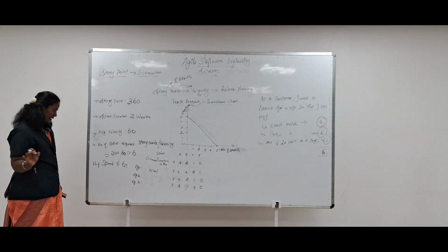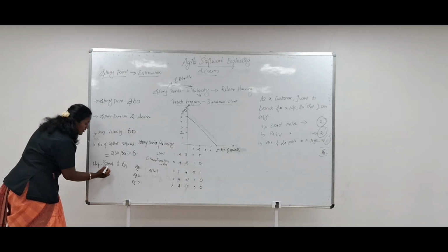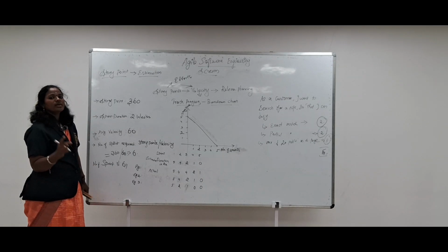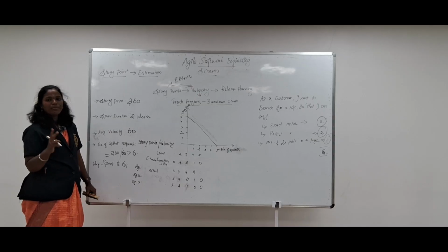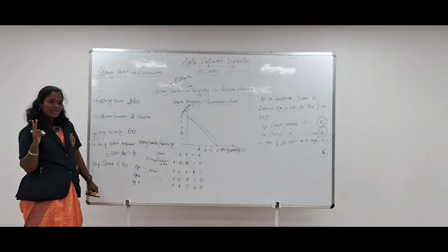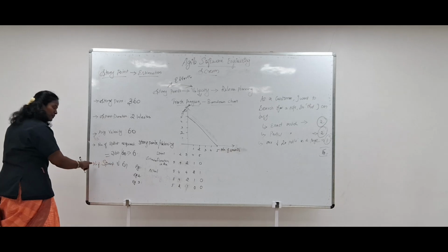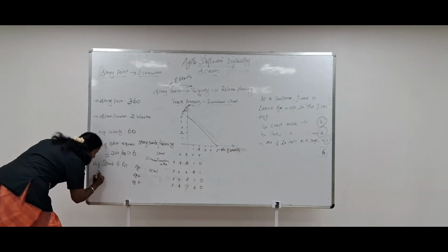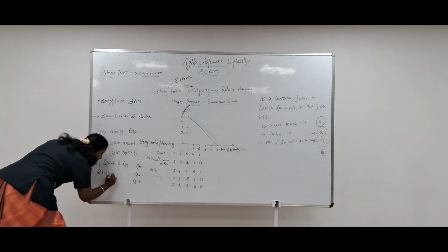The number of sprints required is 6, and obviously 25% for the buffer period, that is 2 sprints.